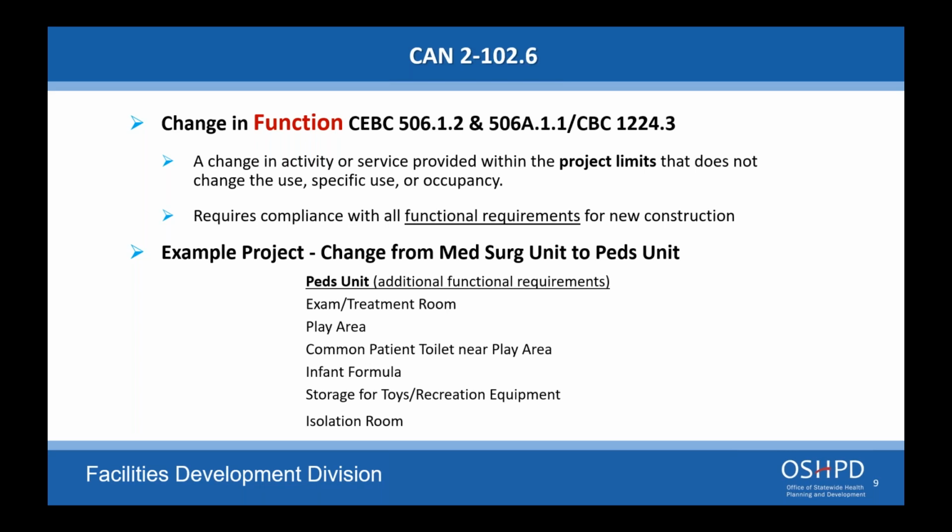All right, so Richard, what triggers the need to issue a functional program? Basically, anymore, it's almost everything. They say it's a change in function. We get a lot of arguments with, say, pharmacy. We're adding compounding to the pharmacy. We're not changing the function of the space. It's pharmacy to pharmacy, but you're changing how the room functions. That's where it comes in.